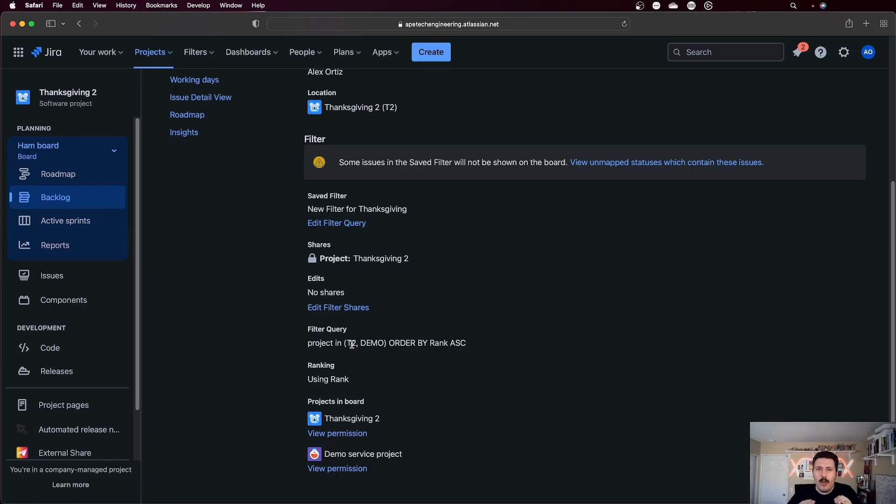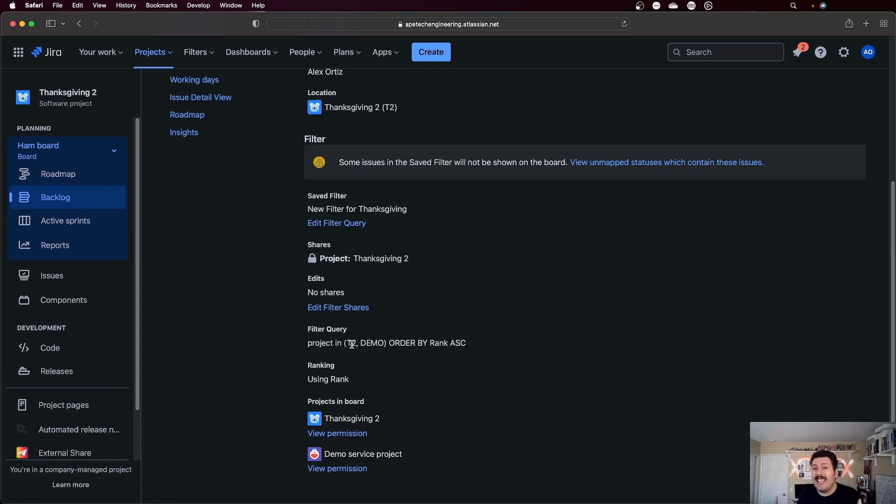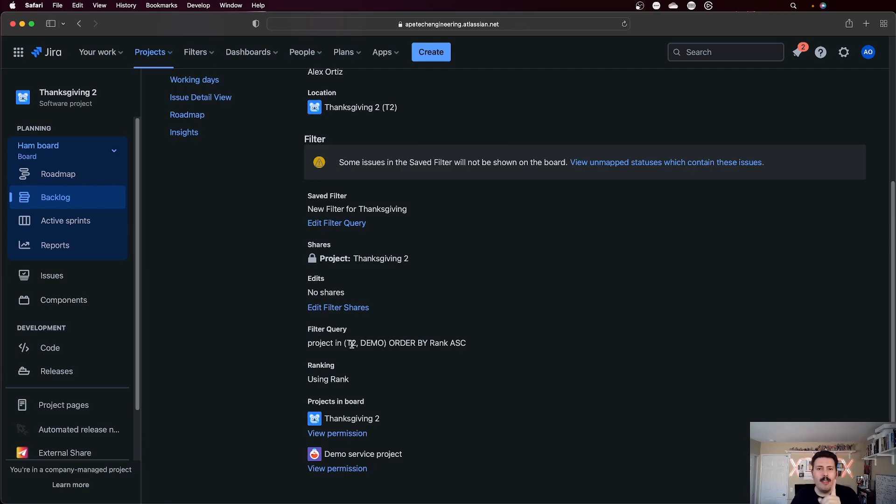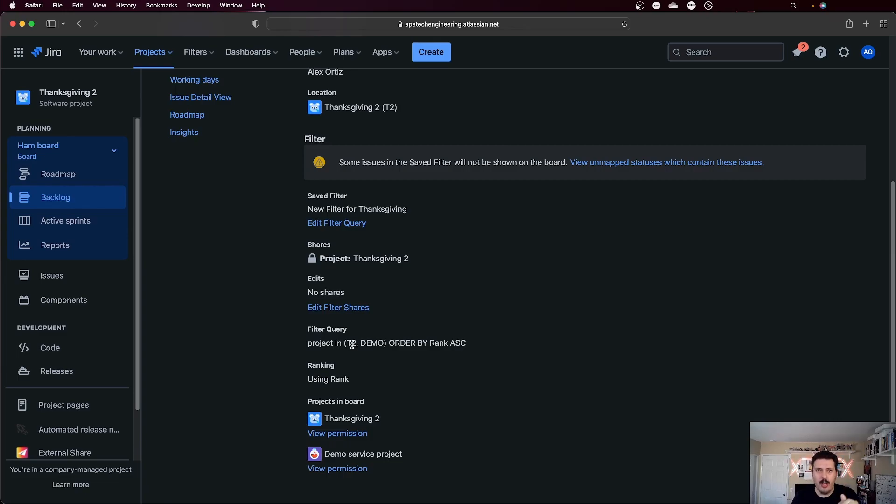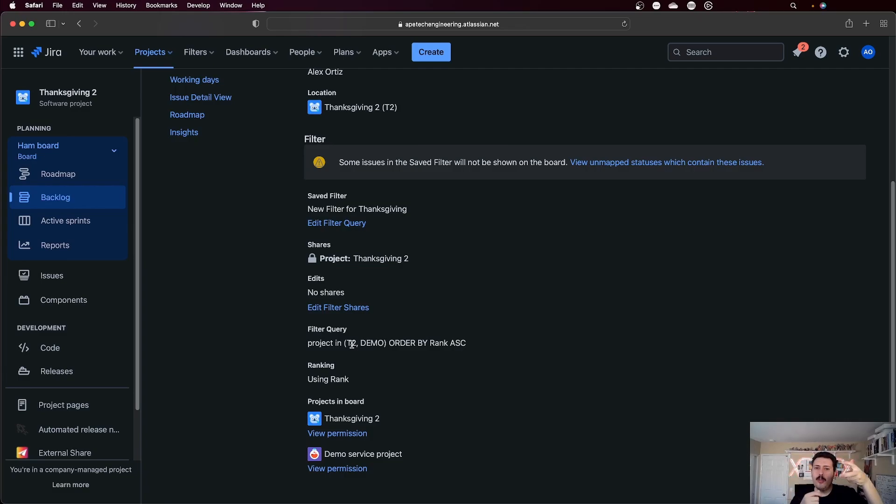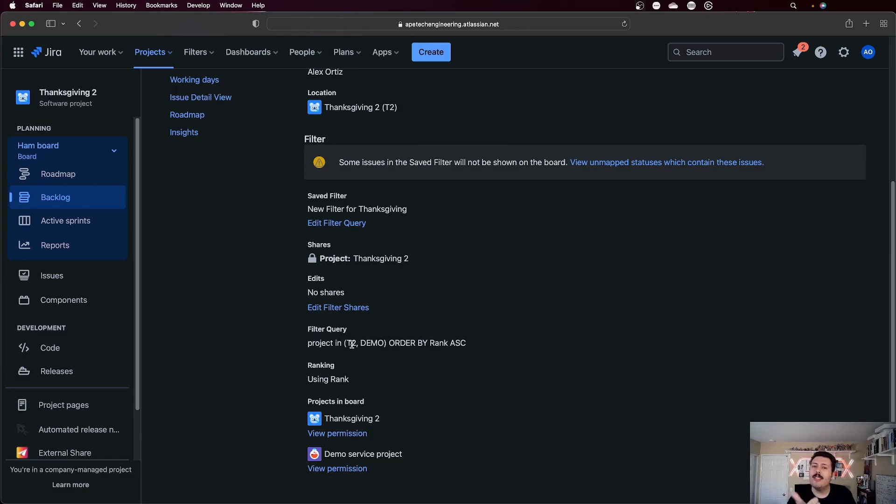When you create multiple scrum boards, this is only applicable to scrum boards, you want to ensure that your filter criteria, whatever technique that you use, I'm going to show you the techniques in a second, but whatever technique you use ensures that your issues, specifically an issue, can live in one and only one board. You do not under any circumstance want an issue to be in two scrum boards at the same time, because when that happens, your issue is going to go in two sprints. And when you close one of the sprints, that other sprint will automatically close as well, even if the cadences were different.